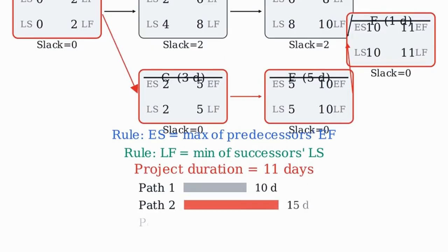Here is the intuition in one glance. If 3 paths take 10 days, 15 days, and 12 days, the project needs at least 15 days. Even if the 10-day path slips to 11, it is still waiting on the 15-day path. The longest path is the critical path.